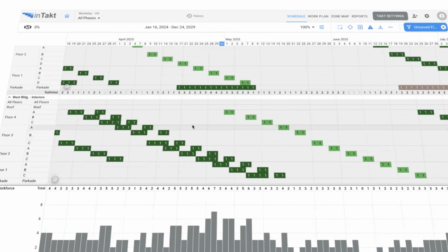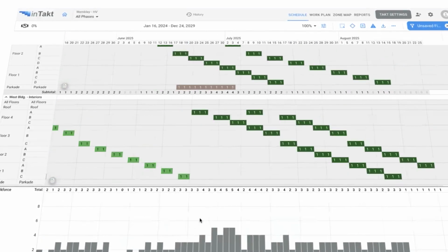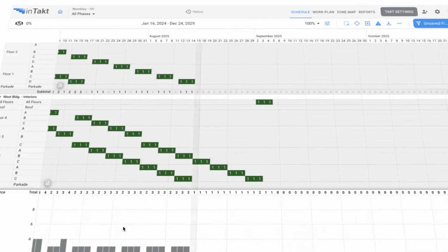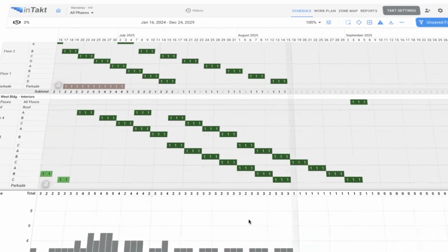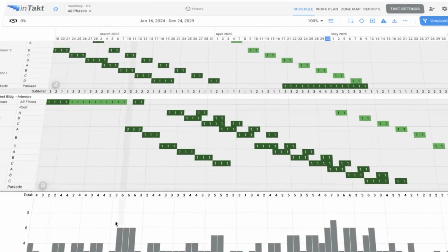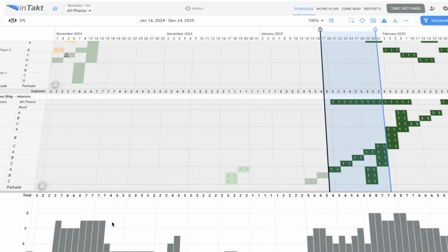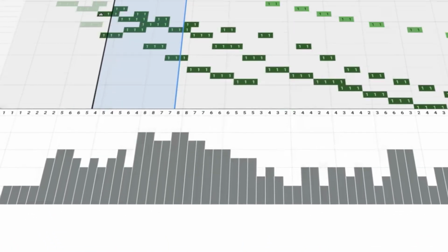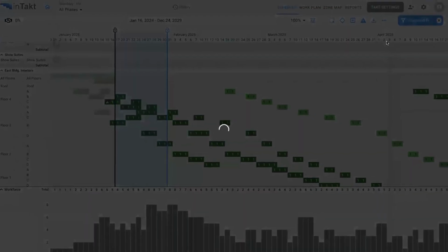So with this, we can make some strategic decisions about, hey, maybe we don't need all of the crews that you have by the end of August, so you can just lower the amount of manpower that you have with us, but we will need you in April or March or so on, right? Those kinds of decisions can be seen right here pretty easily, at the bottom with this graphic. So this is a pretty common tool that we use as well.